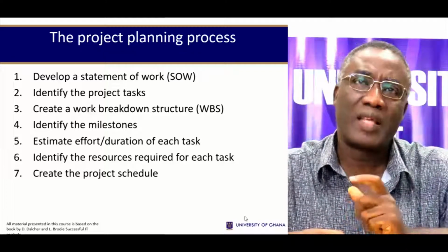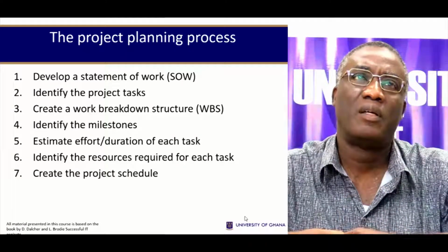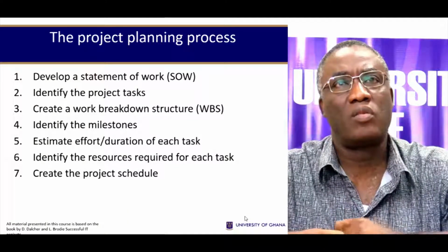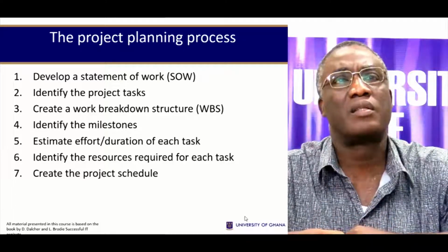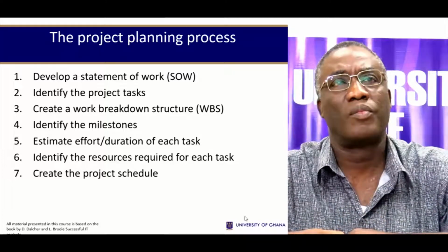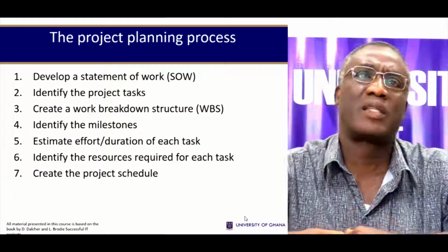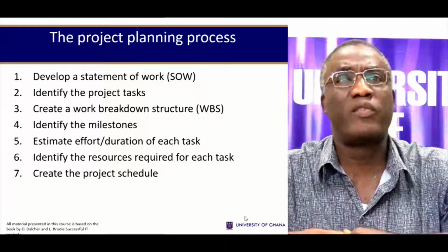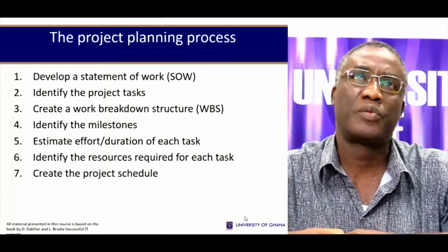Identify the project tasks. What tasks must be done? And then you create a work breakdown structure. That is, these tasks, you break them down into other activities. Identify the milestones. Make an estimate of the effort required for each task, and also the resources required for each task. And then create a project schedule.